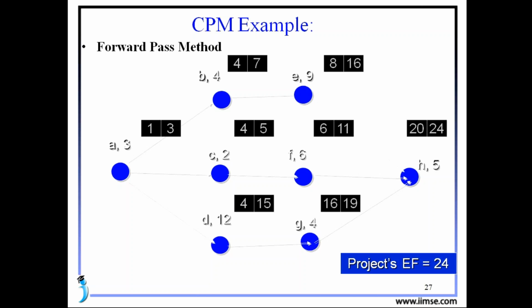Then later we go for B. Whenever we complete our work A on the third, on the same day we cannot continue B. So B will start on the following day. The following day here is the 4th. On the 4th we are starting our B work. So B we can continue 4 days. So on the 4th, 5th, 6th and 7th.